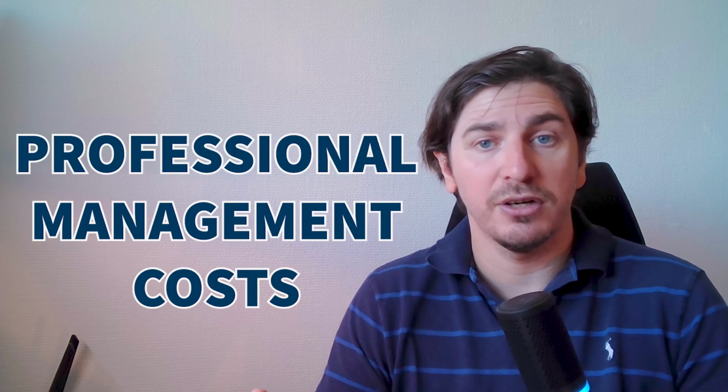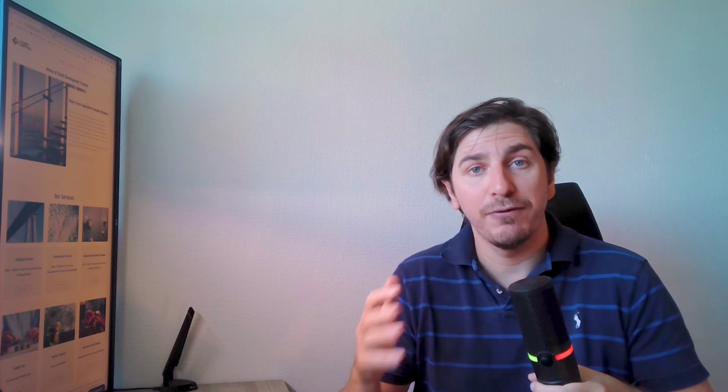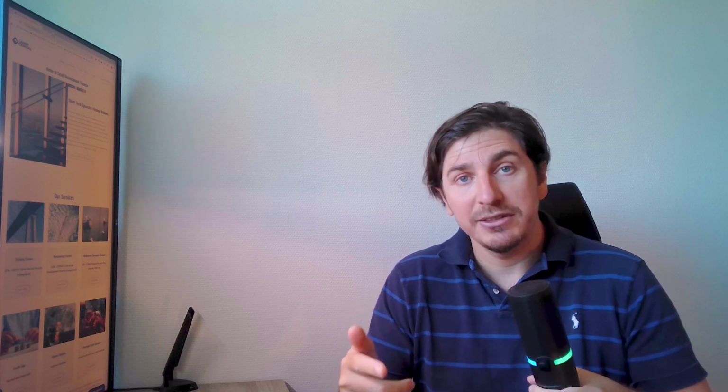Then, as mentioned earlier with the professional fees, I thought I'd go into a little bit more detail on some of those, because you might have some professional management costs. Having somebody like a project manager involved can save you money in the long run because they'll be keeping on top of things for you. And that is their whole role, but they don't come free. So you've got to make sure you include that. Then another professional you will get involved with, if you're coming to the end of the project and you're looking to sell your property, is estate agents. If you're using an estate agent, they typically charge somewhere between 1% and 2% of the sale figure.